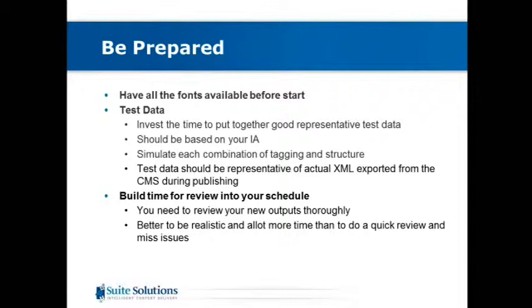When you're building the schedule for style sheet development, it's very important that you build in a proper amount of time for reviewing that. Whoever's doing the style sheets, if it's us, we generally recommend that you take a certain amount of time based on the amount of things that are being done, that are taken out to do the testing. If you know that you're going to have other things going on and you're not going to have time to do proper testing, it's better to lay that out ahead of time and say, hey, we need to allow more time for the testing than it is to do a quick review, because if you do a quick review, it's possible you may miss some issues.